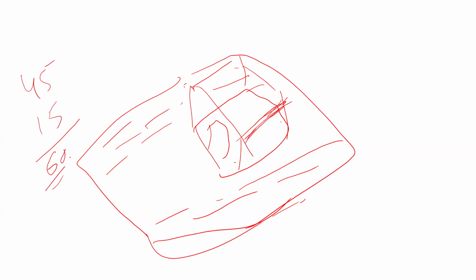The project manager said, sir, this is a problem. What will the problem be? Because if I start putting the landscaping along with this, these people will bring the material, the steel, the cement, and they will dump it somewhere in the open space. I would have put some plants, some lawn there, and they will ruin it completely. It will be a disaster. I will have to redo this 15 days of work. If I try to do it along with them, I appreciate that my work has no dependency there, but I would prefer doing it only after civil construction.